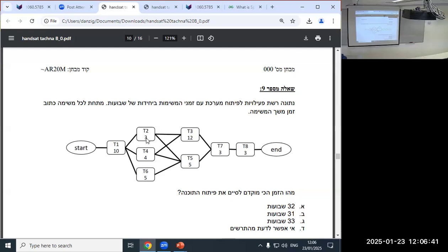No, this one is starting at time 4, and for time 14, right? That'd be another good question, what time does this one start? Starts at time 14. Doesn't start at 13. When does this one start? At time 15. So this one started 1 week earlier, but it finished many weeks later, because it's a long project. And then, fine, so it's 32.